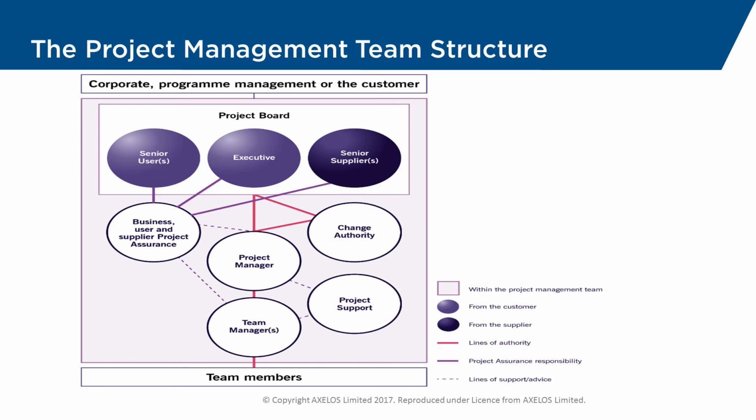And lastly, we've got project support. This is in support of the project manager predominantly and is about administration mostly. So looking after logs and registers, planes, trains, hotels, etc., so that the project manager is able to focus on managing the project rather than dealing with all the paperwork. There may be circumstances where project support also interacts with team managers and potentially even with the project board.